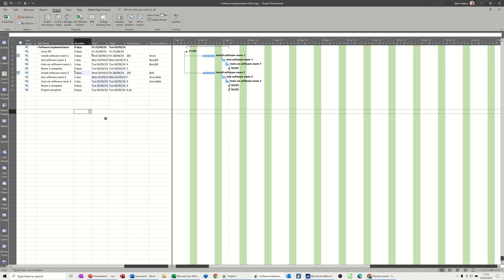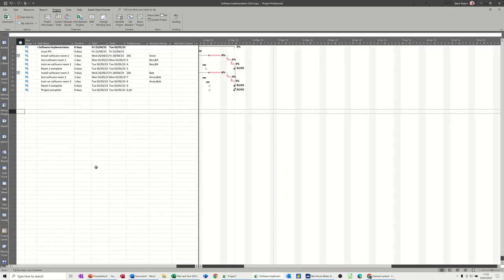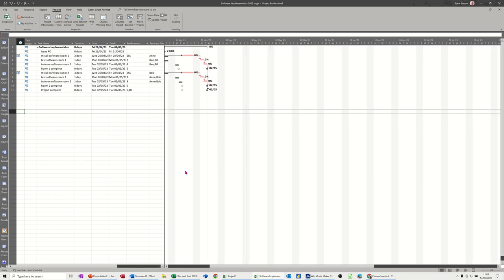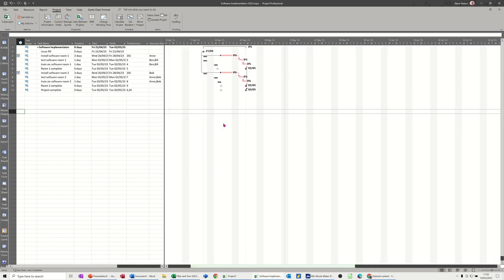So this project on the screen has a baseline. I've saved a baseline and I've updated some of the tasks. If I go to the tracking Gantt, for example, and show you the movement on that tracking Gantt, you can see that there is some movement off the initial baseline. That's the initial baseline and that's the tracking so far.